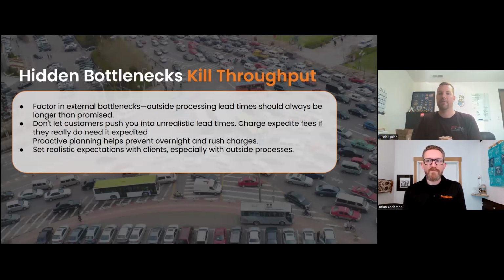If you expedite it to the plater, you've doubled your lot charge at a minimum. So it's not unrealistic for the expedite fee to be more than the entire order on a standard lead time. Be prepared to detail what those costs are, and they quickly understand: wow, this is why it's 8 weeks, and if it's four, I understand why the expedite charge is $4,000 or something like that.